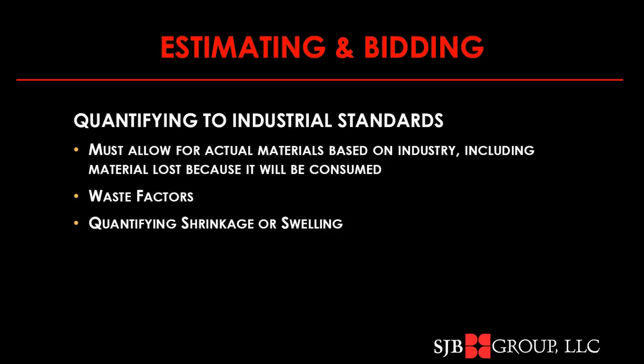All your pipe comes in standard units. Your drainage pipe comes in double random, and that means it could be anywhere from 18 to 22 feet long. They're not all 20 feet long pieces.